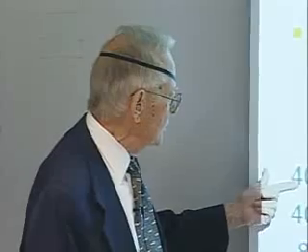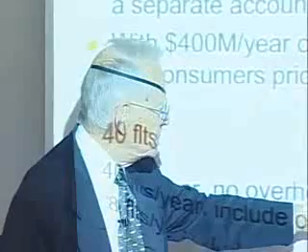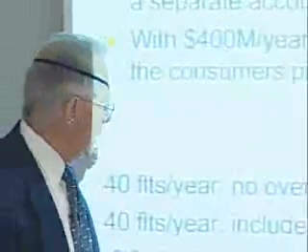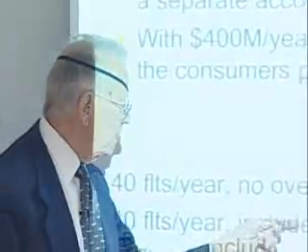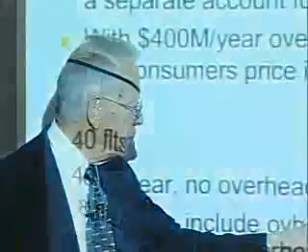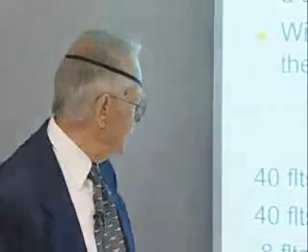40 flights a year, no overhead. In other words, like Apollo, a $10 million price in 1970 would be $23 million by first flight and would be $50 million now. Same 40 flights, but including overhead, would make the flight cost $20 million in 1970, $45 million in 1981, and $101 million per flight for 40 flights in 2005. Huge increase in price because of the inflation that occurred in the 1980 to 82 time period.